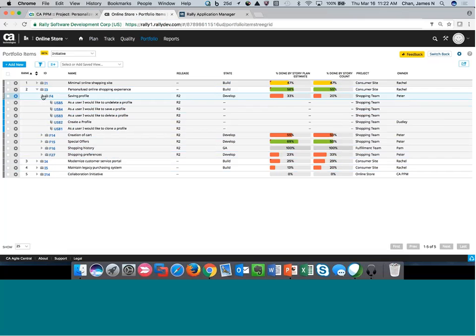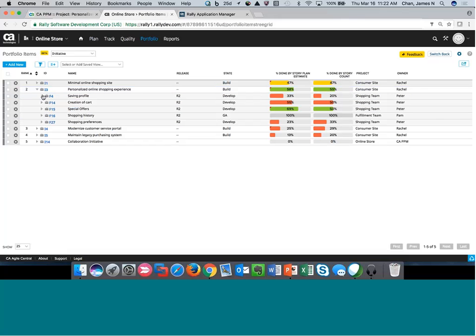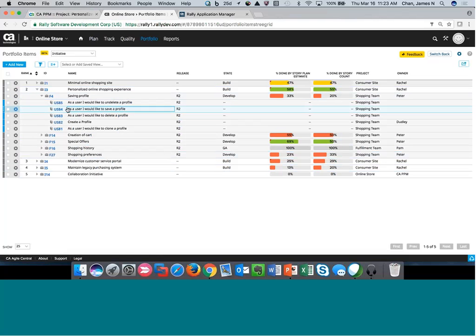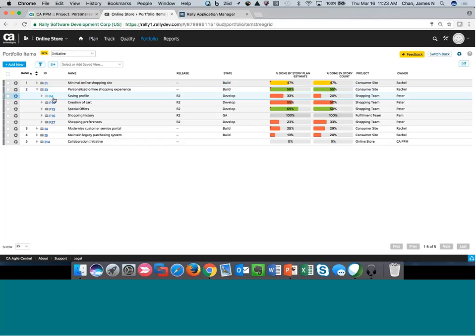To create the initiative on the Agile Central side, there's a process that runs in the background, or if I want to run it manually, I create an action item and run Agile Central Sync. At that point it creates the initiative on the Agile Central side. Once the initiative is created, the teams break out that work into features. The first level maps a PPM project to an Agile Central initiative — in this case, a 'Personalized Online Shopping Experience'. When teams break down the work, they create features that come back into CA PPM.